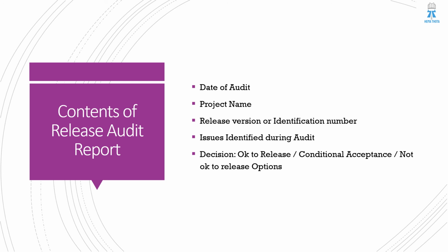So generally, in practice, the release audit is conducted on the last day of the release. However, plan for it at least one or two days prior to the release, so that you will have enough time to fix all the issues identified during the audit. So hope you got this concept.